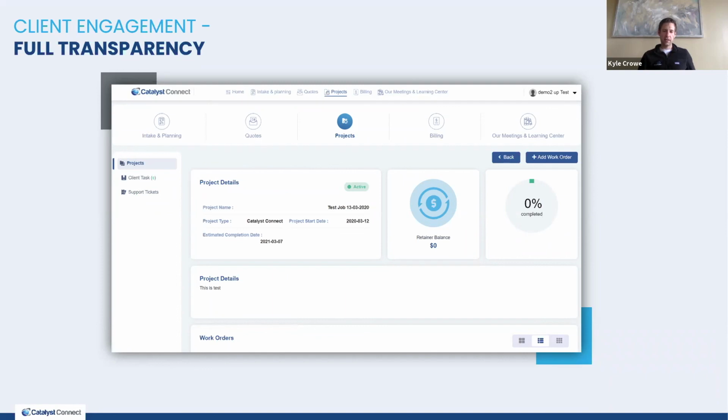I think that's a big thing in today's world, so that a client can get the budget information, the task information, the timeline information whenever they want, and it is up to date. So we use a lot of Google Sheets, some other project management tools for our clients to be able to see all of that. And to the transparency point, we make sure we bring it up in all of our weekly syncs. If we are over budget or there's maybe some tension there, we try to address it up front and just get that out in the open, because it is not going away at any point.